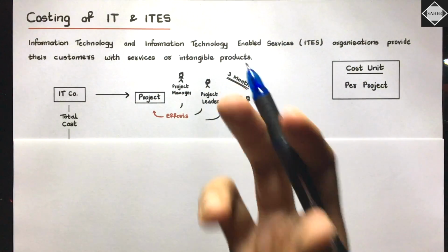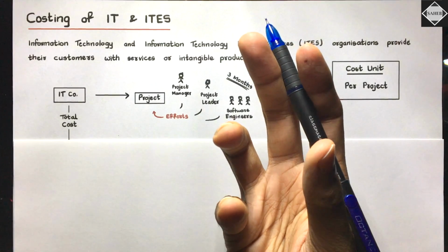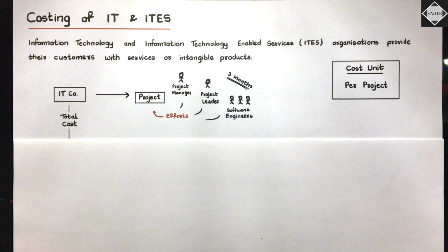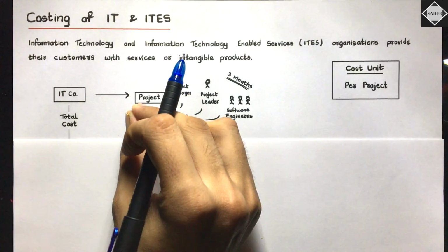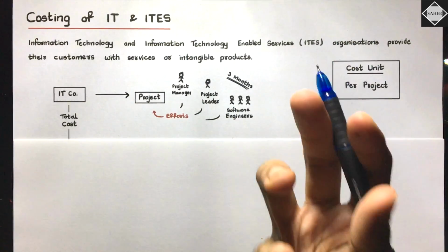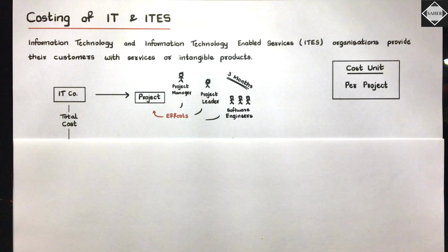Overheads. What are you going to do about these overheads? This is common for all the projects, isn't it? The overheads are not specific to any project, so you have to apportion them on the basis of total salary.